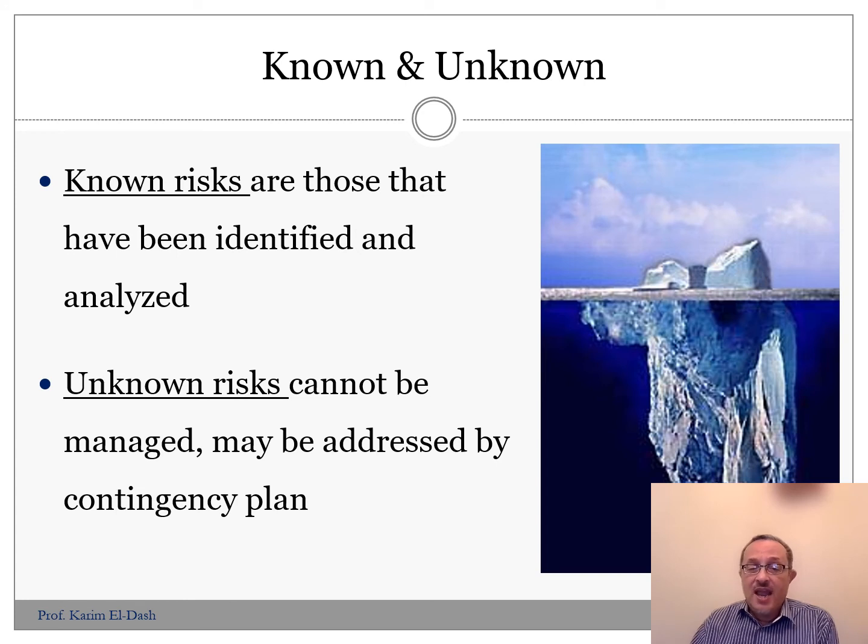These were issues in previous projects that we suffered from. We have experienced those before, but not in all projects. If it's in all projects, that could be part of the plan. But if there are rare cases or low probability cases like 10%, 20%, 30%, in this case, those are potential risks, and we have to consider them in our project risk management if the impact is considerable. If you are assuming that those might happen, but the impact is like 1/1,000,000 of the budget, in this case, we don't have to consider them.